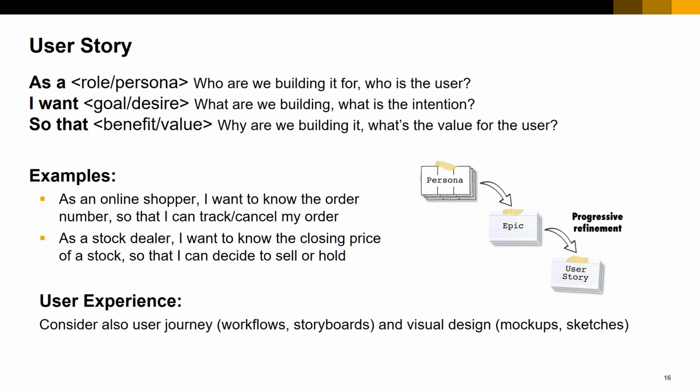That's why we start to think from the user's point of view: as this person who is going to be the user, what does he want, so that he can achieve what? That is the typical user story format. So, as an online shopper, for example, I want to know the order number so that I can track and cancel my order. It's a sample user story, right?